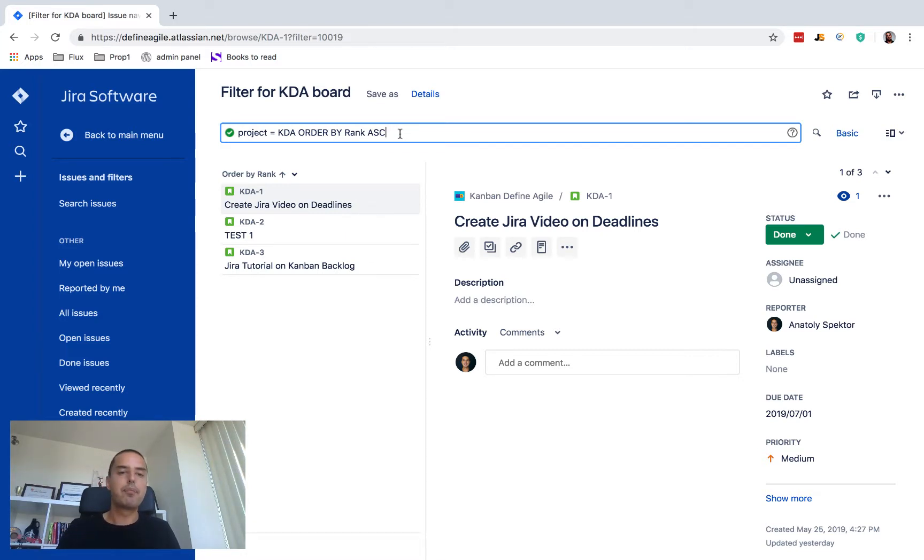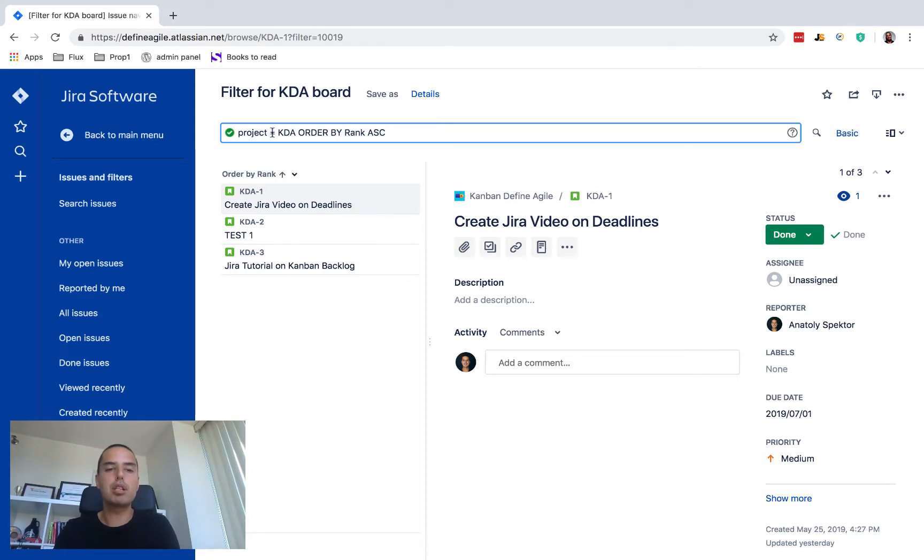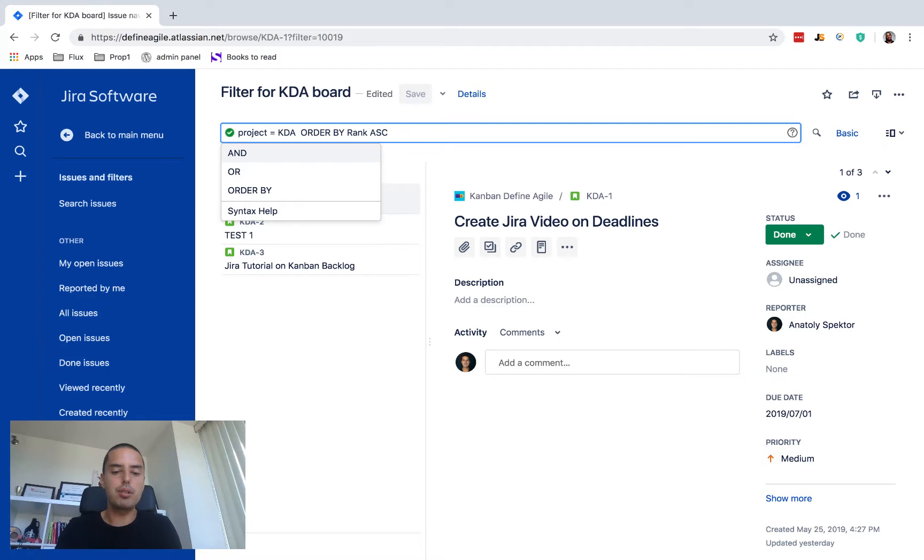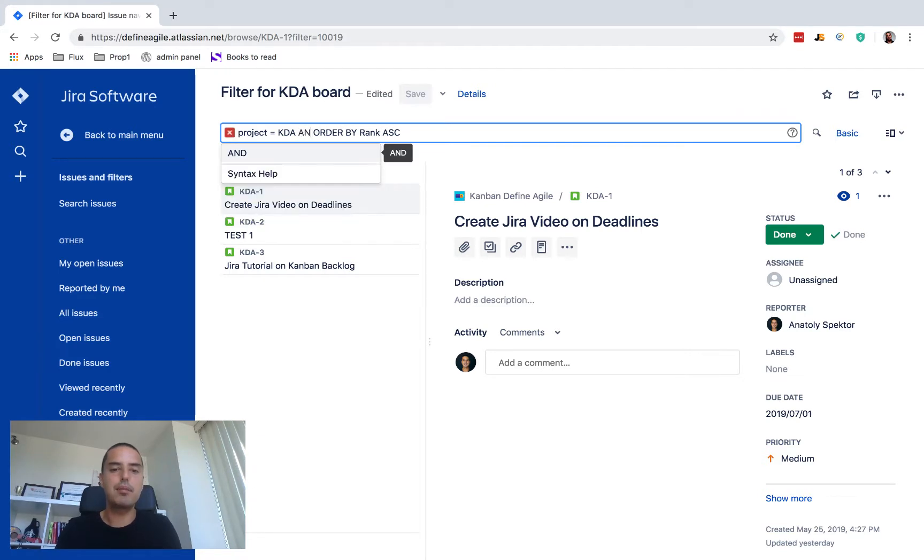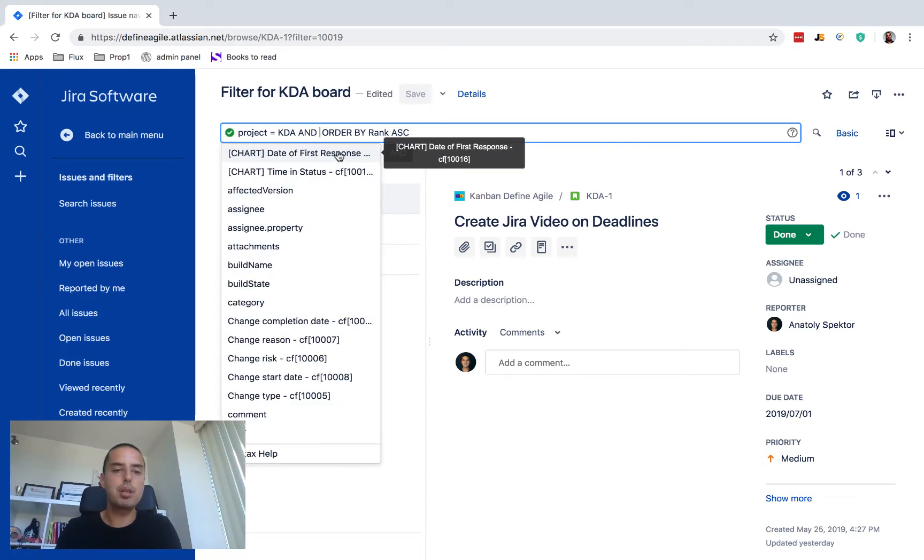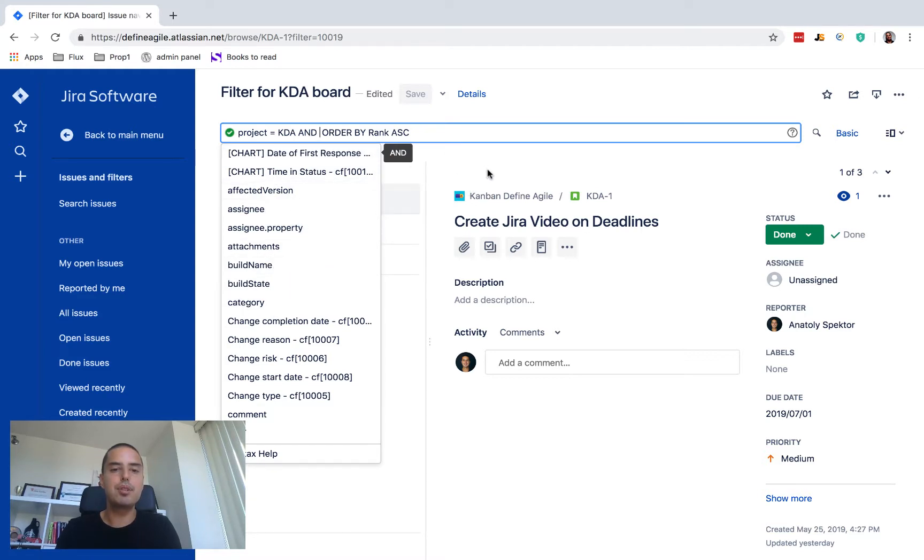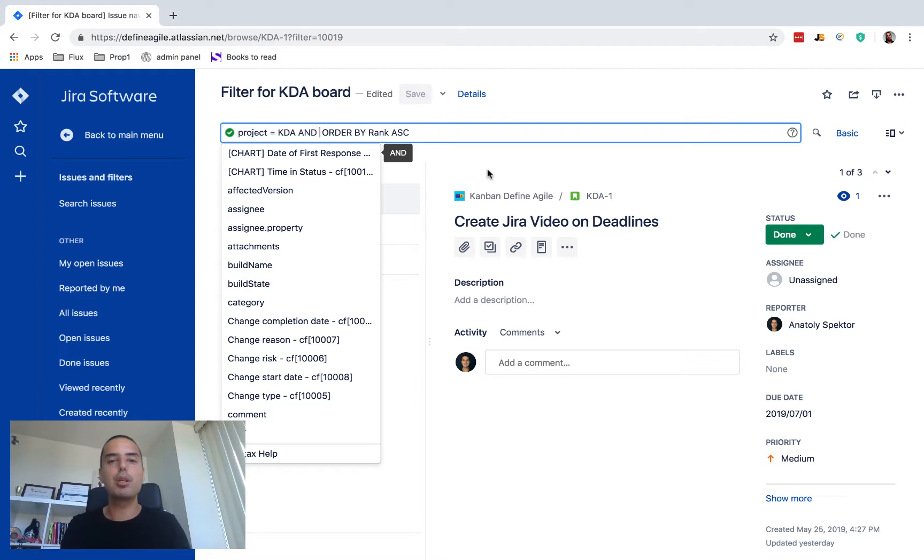But for now, we don't want to show any issues that are in a status done that were resolved longer than one day. So let's just do it. First of all we say okay, we're still okay with project equals key KDA, but we also need something else. So to do that we put 'and'.